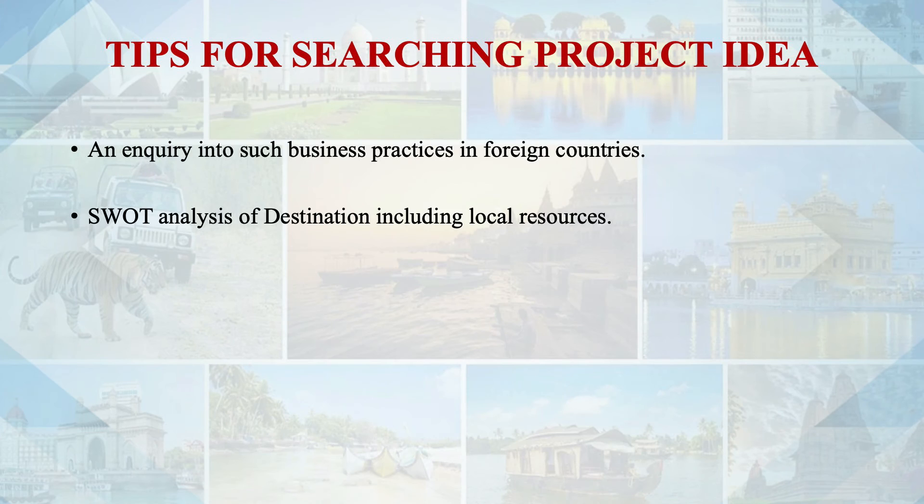A SWOT analysis of destinations including local resources is important. For example, you can develop desert tourism in a desert, but developing water sports there would waste resources. In Shimla, Himachal Pradesh, water supply issues for local residents led to resistance against further tourism development — highlighting that if local resources are not supportive, long-term sustainability is threatened and project failure chances increase.